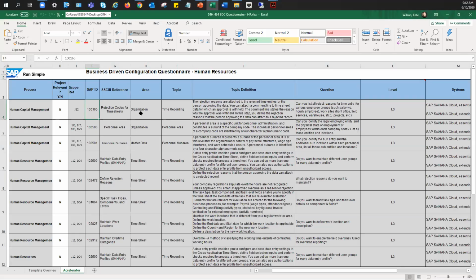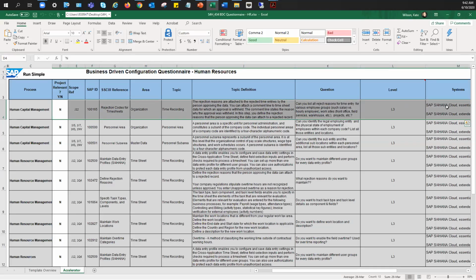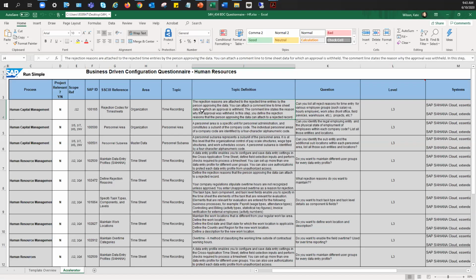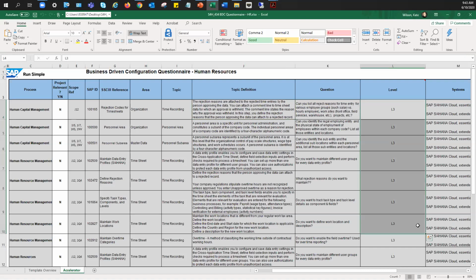So you complete the on-premise training course for HR. You are an expert in this. So you're collecting these configuration values by delivering essentially small workshops to talk about configuration items specific to each line of business. The level is referring to the order in which you configure these things. So level 3 is you configure them essentially last. Level 1 is you configure those things first.